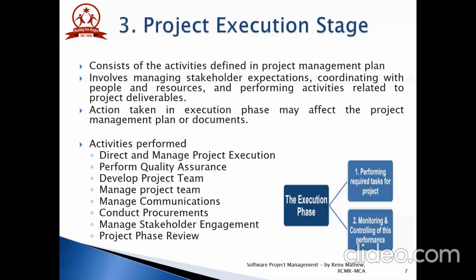This stage also includes actively managing stakeholders throughout the project. To avoid unexpected project delay or abandoning the project in between, stakeholder expectation is identified and quickly resolved. There are 5 inputs to the manage stakeholder process: stakeholder register, stakeholder management strategy, project management plan, issue log, change log, and organizational process assets. The outputs of this process include organizational process assets updates, change requests, project management plan updates, and project documentation updates.